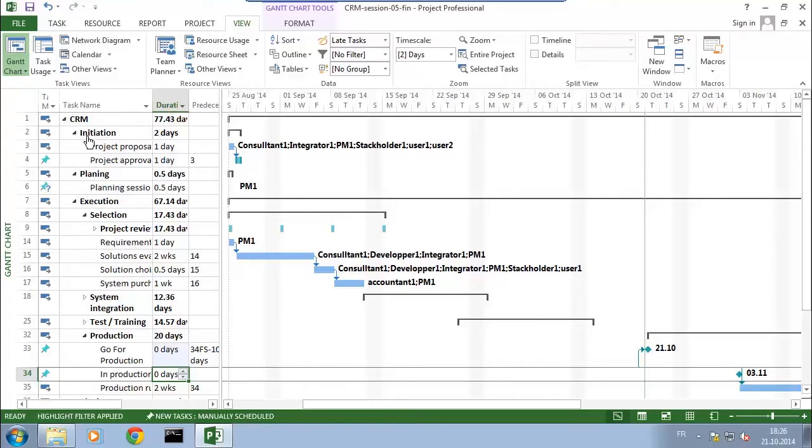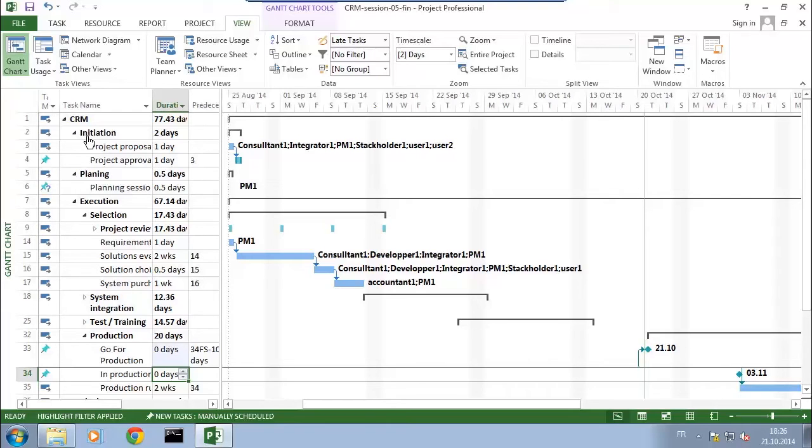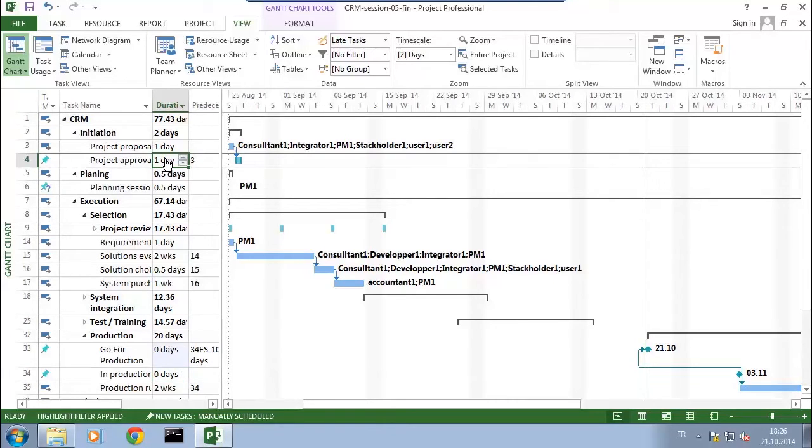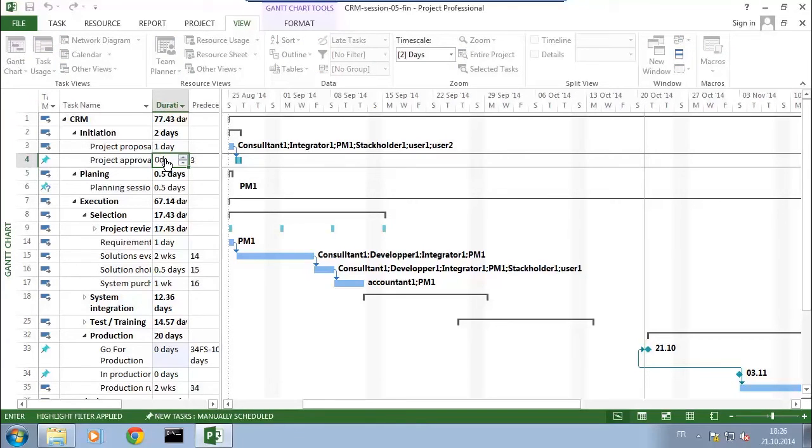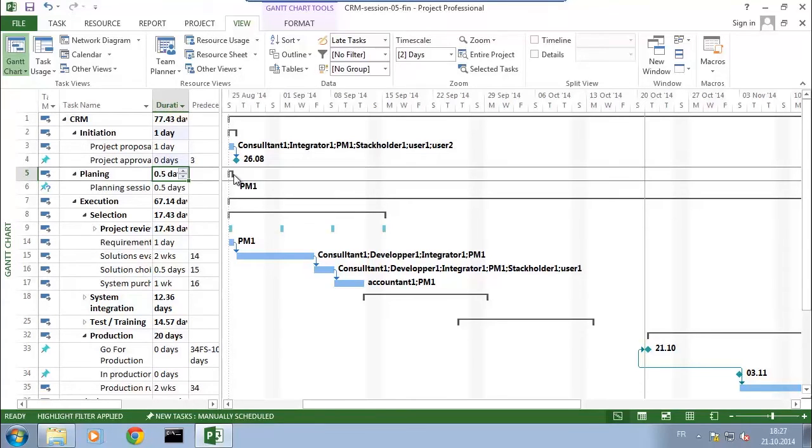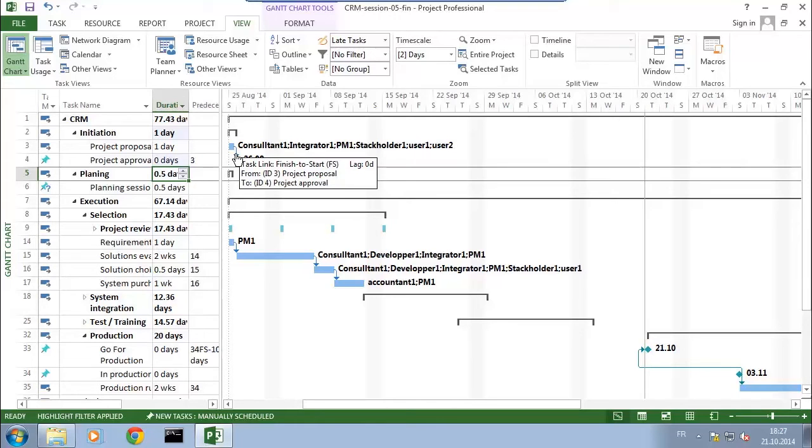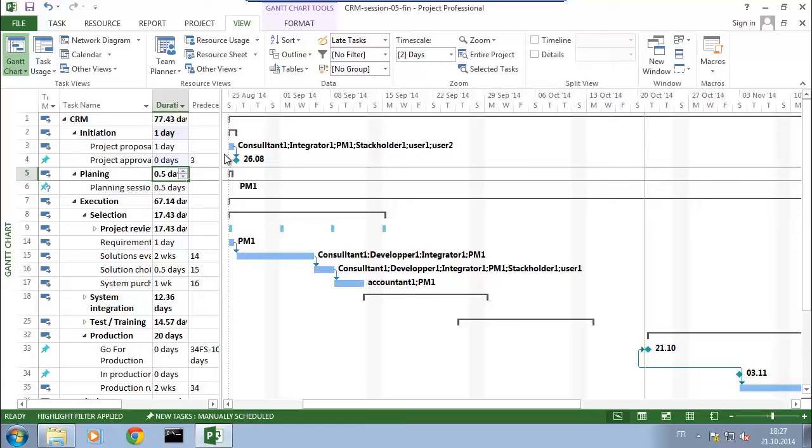For example, here we start the project from the idea, we discuss it, do the project proposition, and at one point there will be the approval. For me, it's always a good point to set the approval as a milestone. I select the task here and simply set for that task a duration of zero days. By setting it to zero days, it has changed its shape to a diamond shape, which is what we call a milestone.